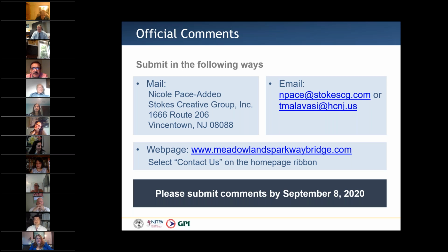If the IRC, the Interagency Review Committee, approves the project to advance to the next phase, then it's a 2-year preliminary engineering study and then a 2-year final design, and then that's when it reaches construction. So it's officially about 5 years out before it reaches construction. I hope I answered that. Yeah, assuming everything is funded.